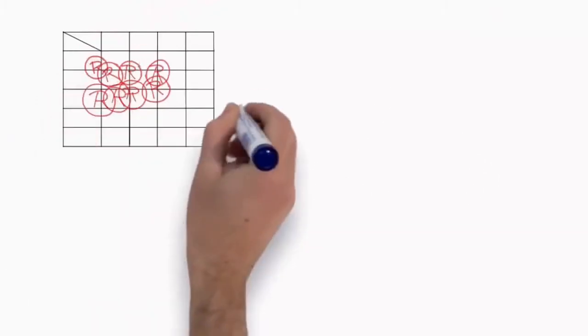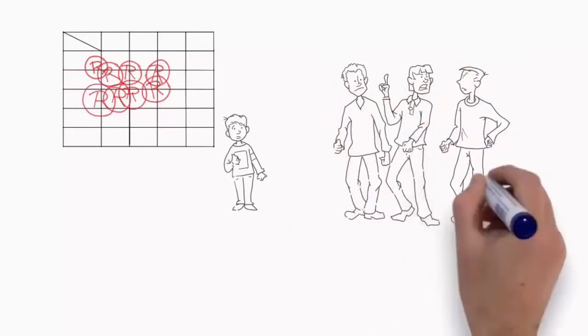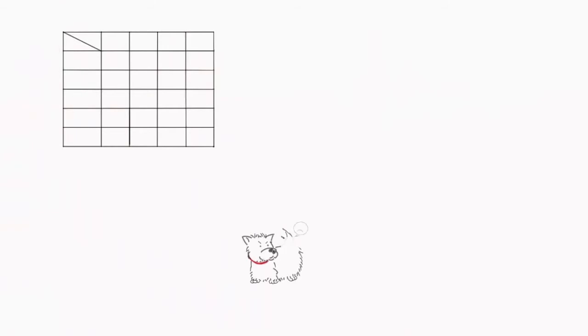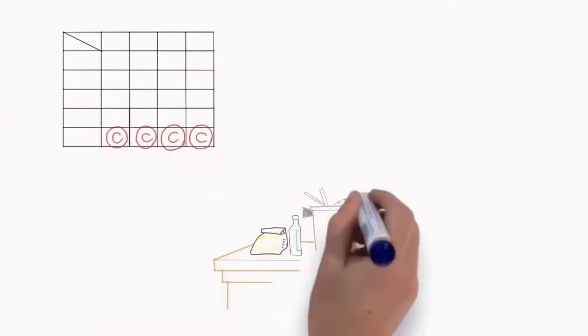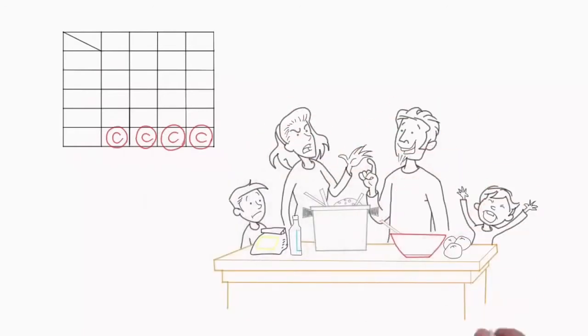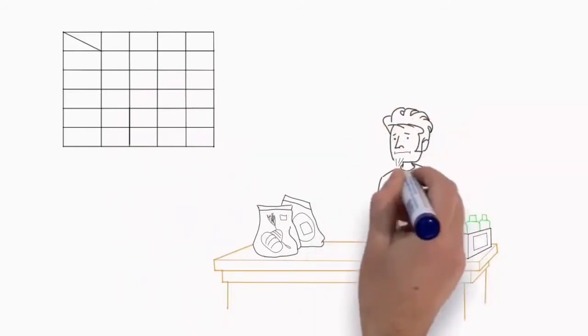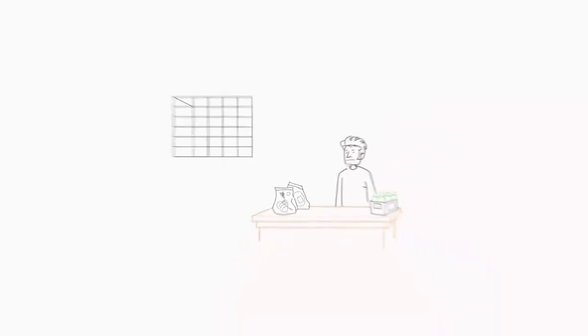If you've got heaps and heaps of R's for one activity, you may want to ask yourself the question, do we have too many roles responsible here? If you've got no R's for an activity, it won't get done. If you've got too many C's allocated to a task, you may be confronted by paralysis by analysis. No C's and no I's on your chart could be a sign of not having enough communication within the teams. So it's a really good idea to analyze who's doing what.